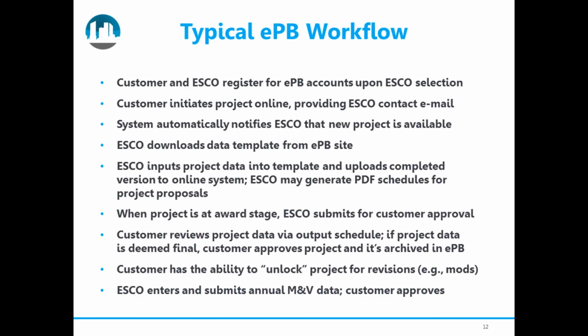So just a recap of the workflow, the customer and the ESCO both register. Upon ESCO selection, the customer can then initiate the project. It takes less than a minute for the customer to initiate the project. And part of that initiation involves entering the ESCO contact's email. The system then notifies the ESCO that the project is there. When the ESCO is ready to upload project data, they do so using the template.